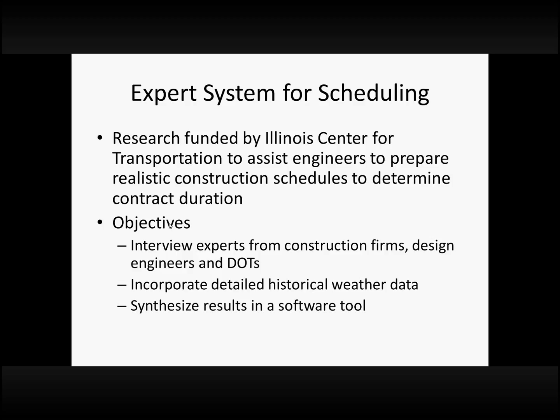So the way we approached it, our objectives were to interview both people that work for construction firms, engineers, and also various resident engineers at the different district offices of IDOT to get information on how they did scheduling and some things about production rates. And one of the things we really wanted to look at was how weather data is used to determine the number of working days and when something is a working day. Especially since Illinois is such a tall state, north-south, weather varies quite a bit.